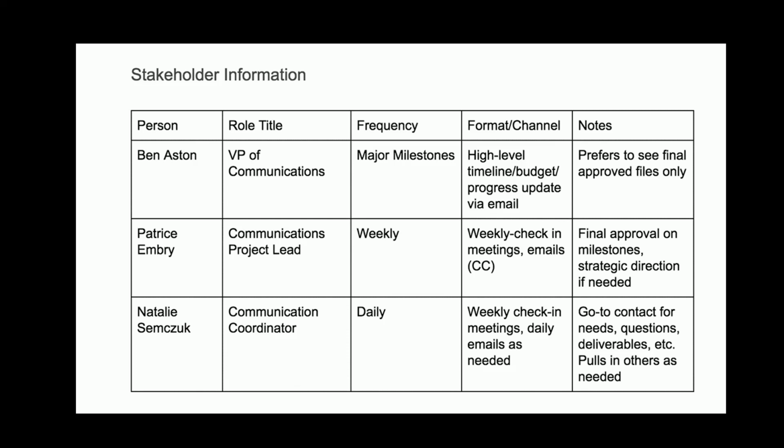The one thing this is missing is who is actually doing that communication. Is this the project manager? Is this a member of the team? Is this the sponsor? So it's useful to know not only who are you communicating to, but who in the project is responsible for doing that communication itself. Because the project manager shouldn't be doing everything. The role is busy enough as it is, and you're not necessarily the best person to influence everybody. Remember, leveraging the project board or the sponsor to help influence and manage some of the stakeholders could be far more powerful than you trying to do it yourself.